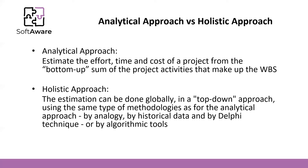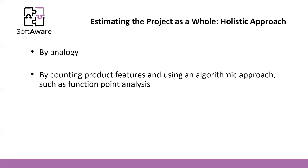But we can do it differently. We can use a holistic approach. It is the estimation that can be done globally in a top-down approach using the same type of methodologies as for the analytical approach — by analogy, by parametric estimator, by Delphi, or by algorithmic tools. So in a holistic approach we estimate by analogy, by counting product features, and using an algorithmic approach such as function point analysis.